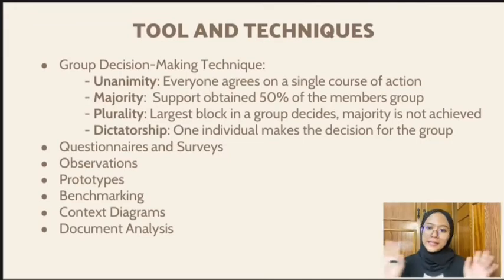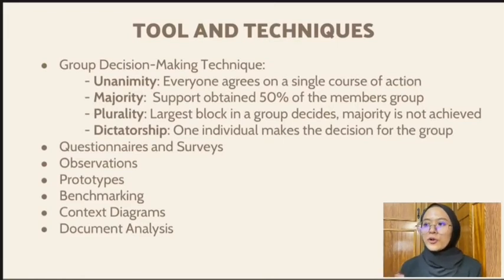And the next technique is prototype. In this technique, a model of the proposed product is developed, and then this model is presented to stakeholders for feedback. For example, a smartphone manufacturer will produce a new smartphone. So in order to get feedback from stakeholders, features and functionalities from existing smartphones can be combined in a prototype, and this prototype can be presented to a set of consumers to get their feedback.